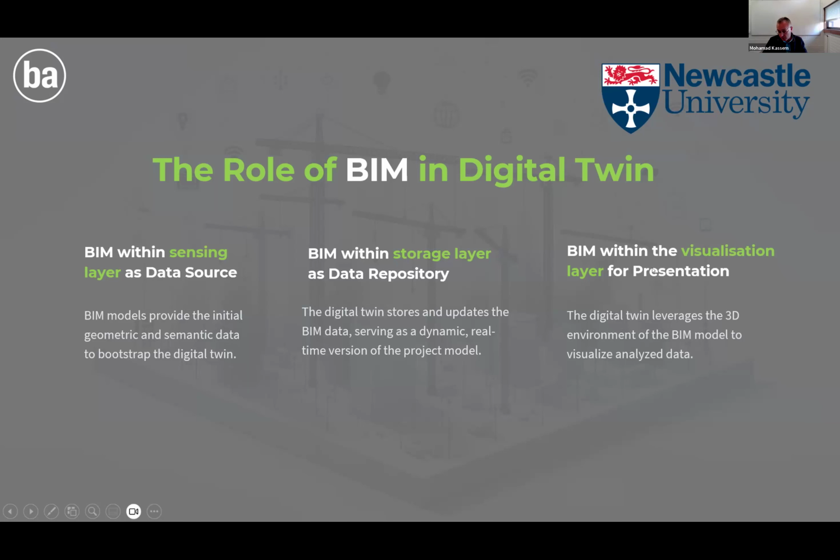Going back here, we had funding twice from the government to look into this problem. We worked on it over the last 5 years. We identified the use cases. I won't go through each use case, but it's self-explanatory in this table. We can do better estimation of equipment usage if we implement digital twin. We can estimate task progress and roll that up to understand program performance and manage the program better.